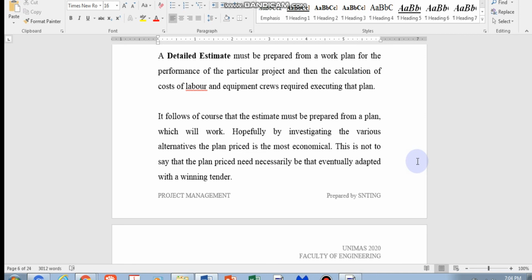You need to split up into different categories of costs, and then from there work down on the rate, how much it is per cubic meter, how much the workers are charging per km of pipe or per meter run. All this is actually rates that are available in the industry, so you can base it on standard rates.